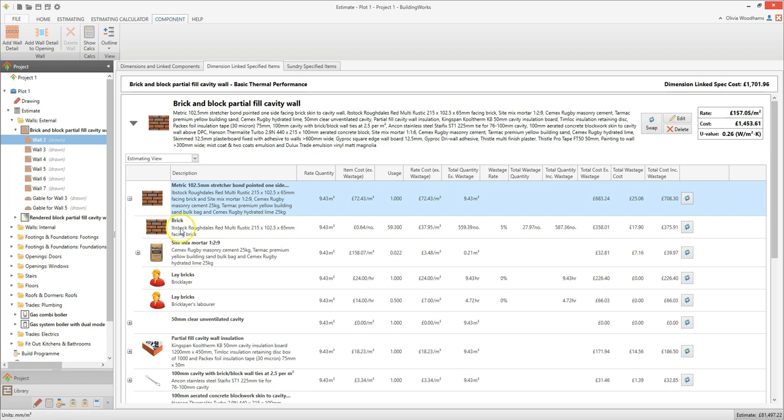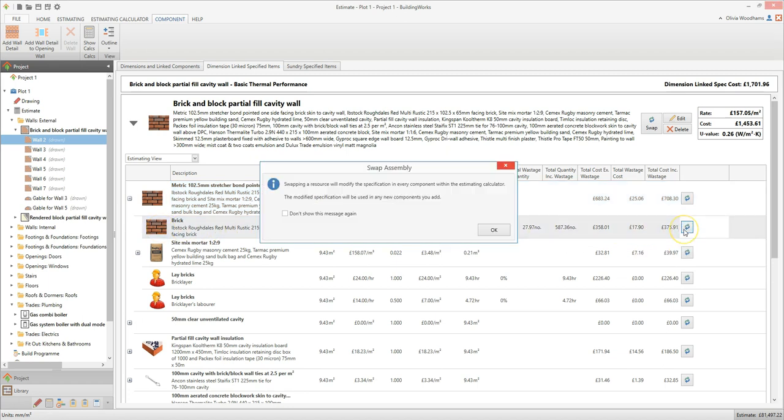Once you click the swap resource button, a dialog box pops up explaining that changing a resource within the specification will change it across the entire estimating calculator. What this means is that if you change the brick type in wall 2, the brick type will also change in walls 3, 4, 5 and so on. The brick you select will also be used in any walls you estimate in the future using this estimating calculator. Click OK.